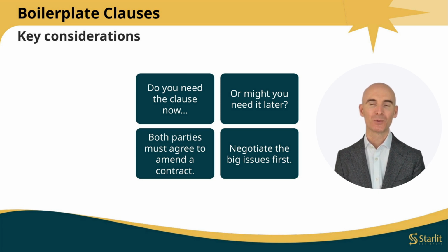Finally, whilst boilerplate clauses can be very important to a deal, more time should be spent on the top priority topics, including where disagreements are most common. For example, making the scope of work clear and getting the payment mechanism, caps on liability and exclusions of liability right.